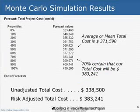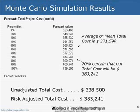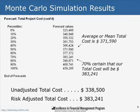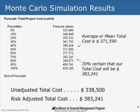When we run the Monte Carlo simulation, it tells us the risk-adjusted values at different confidence intervals in 10% increments. At the 50% interval — the average or mean value — that is the minimum risk-adjusted number you would use. On average, the final total cost to actually do this project could be as high as $371,590. Most people accept confidence intervals above 50%; they want more than average. So they commonly choose 60%, 70%, or 80%. You don't want to go too high, because then you're allocating way too many resources to the project.